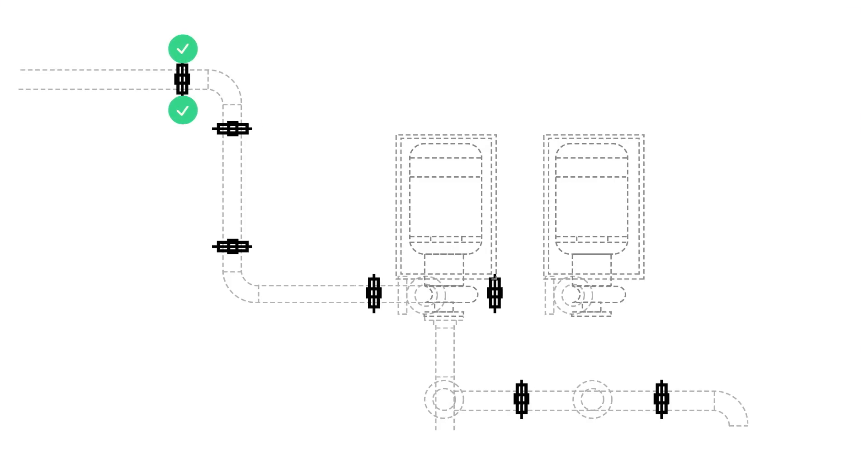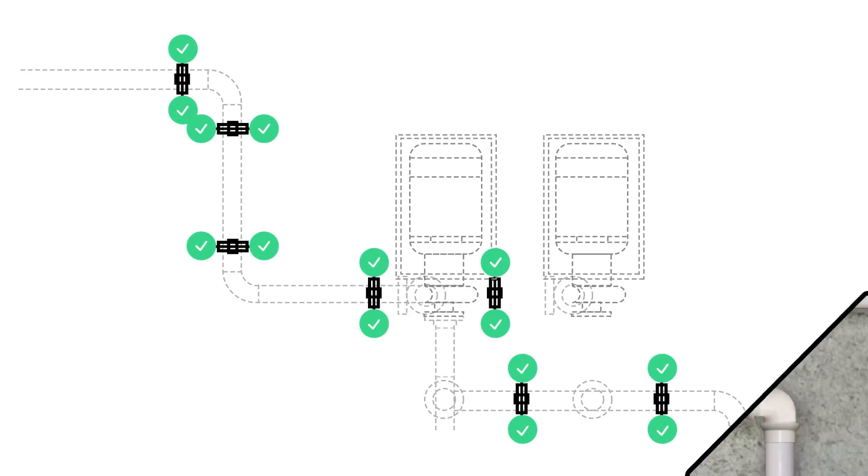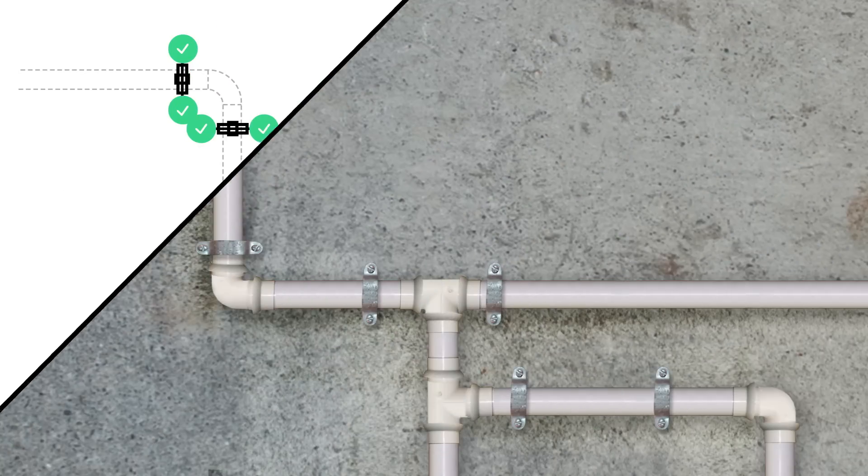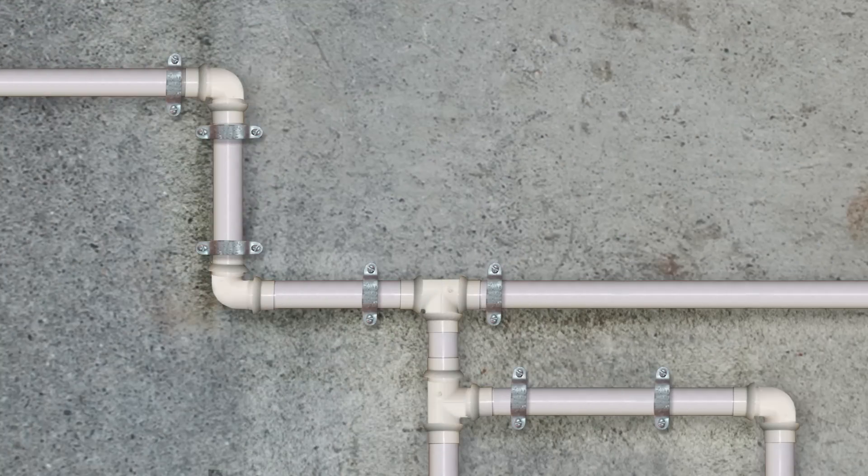This drastically reduces the need for change orders, because the model and reality stay completely aligned and the project is more likely to meet all of the tolerances specified.